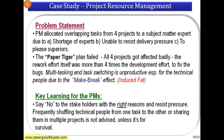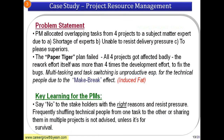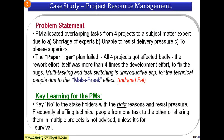The art of resisting pressure is very important. There may be pressure from your customer, from your senior managers — pressure from all over. How you handle and resist pressure is very important. Also, frequently shuffling technical people from one task to another — telling them to do this task now, then switch after half an hour, then go to another project — is a huge waste in a project. Multiple projects and multiple tasks for key team members is not really advised.